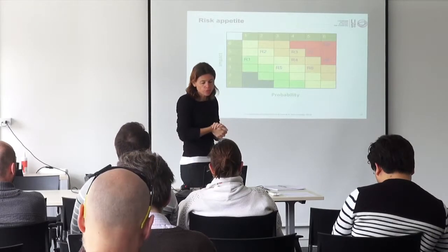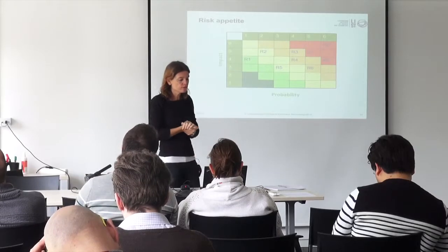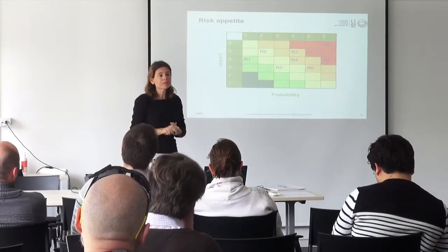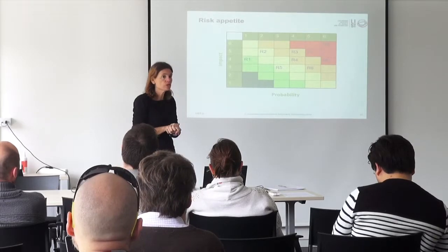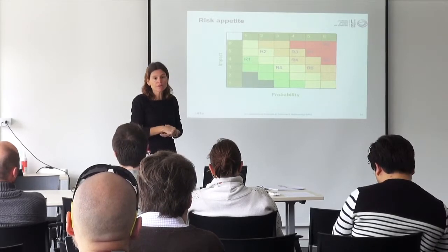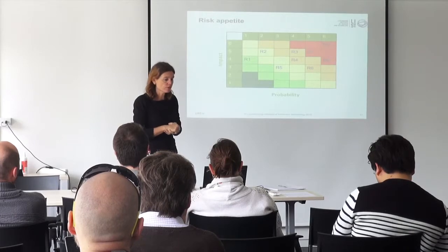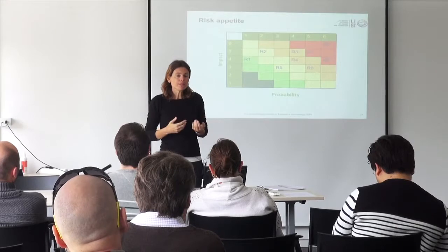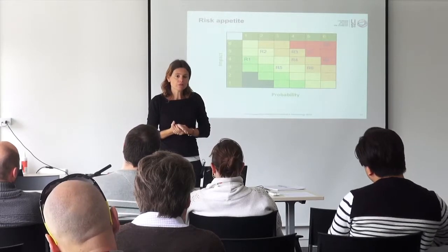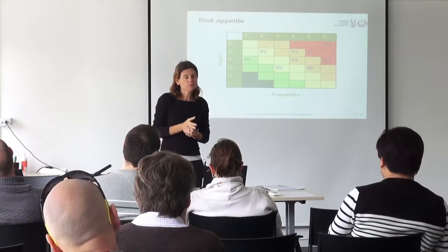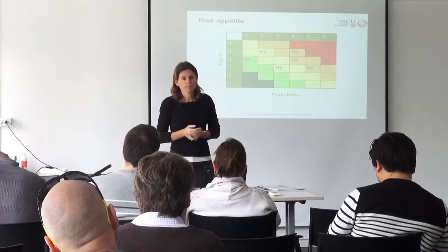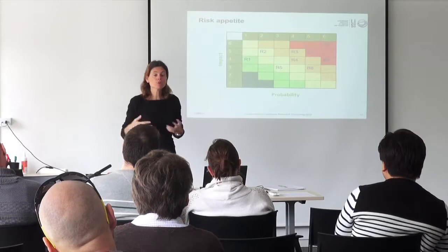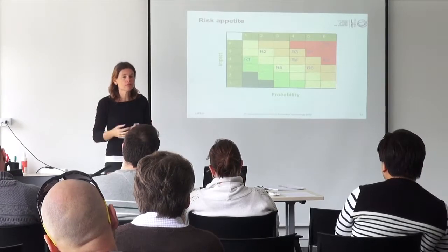So this brings us to another notion, which is the risk appetite. It might be something that you are not aware of, that you cannot measure, but in some organizations it's pretty clear. The risk appetite is the ability or the willingness of that organization to accept risks or not. There are some organizations that are more risk-oriented than others.